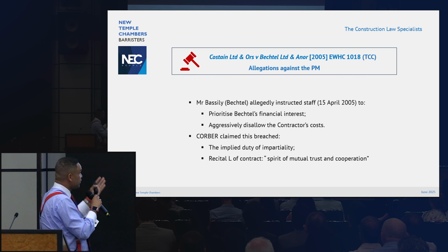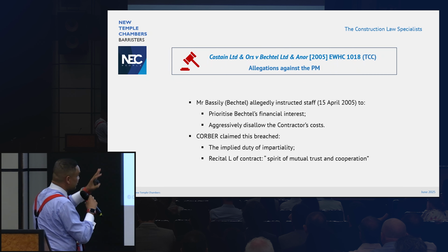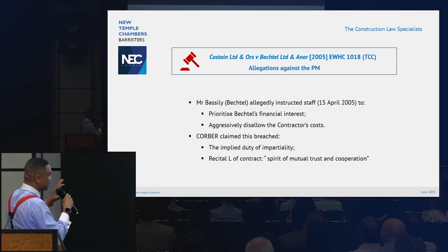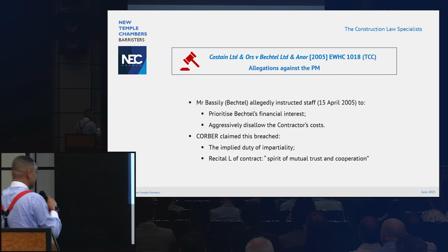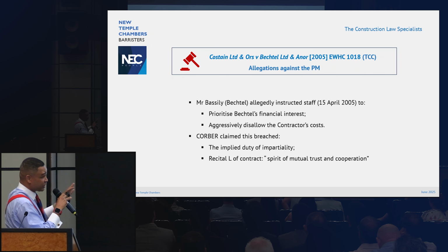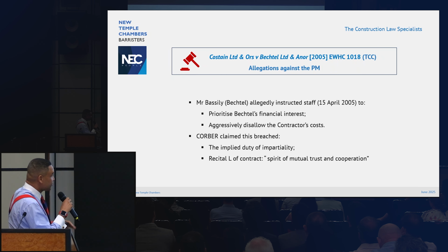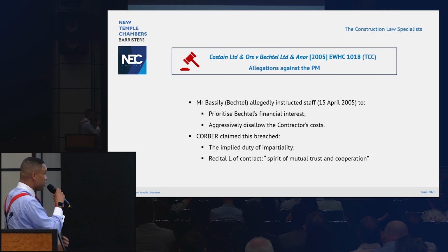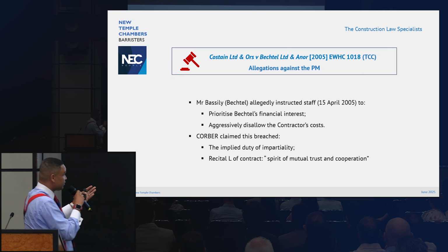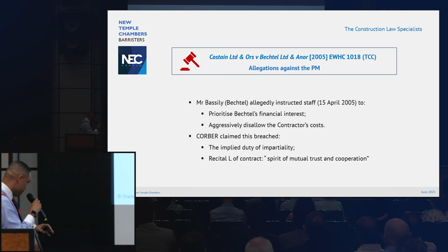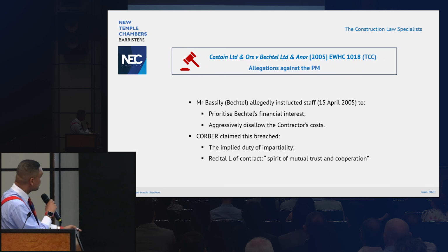In this instance, a chap from Bechtel allegedly had instructed staff to prioritise Bechtel's financial interests and to aggressively disallow the contractor's costs. It was claimed that there was an implied duty of impartiality, and recital L of the contract, the spirit of mutual trust and cooperation.